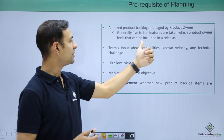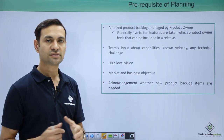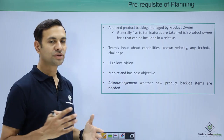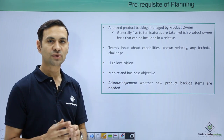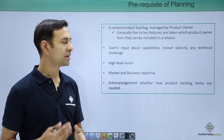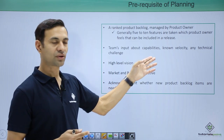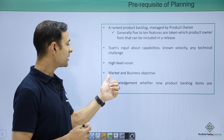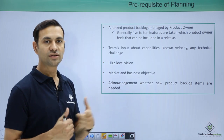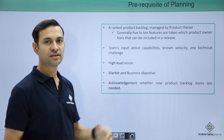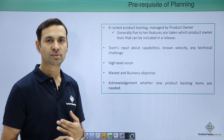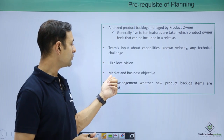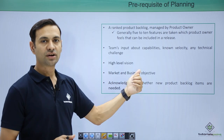Team input about capabilities and velocity — how much effort they can put in this particular time frame — is needed so that a particular feature or user story can be developed, and to identify any technical challenges. The high-level vision should be completed, and the market and business objectives should be met for these features. If a feature gives no business value to the customer, there is no use of developing it at that time. So we have to see whether market and business objectives are met or not.